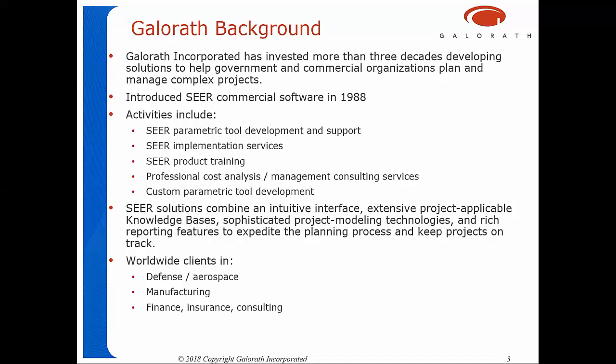So you answer a few questions like that up front with any of our SEER models, and it automatically populates most of the inputs with industry average type of data. So that's a really quick and nice way to get going on a project without having to make a lot of inputs. And of course, you can go back and modify any of those inputs that you need to as you proceed. So that's just a word about knowledge bases.